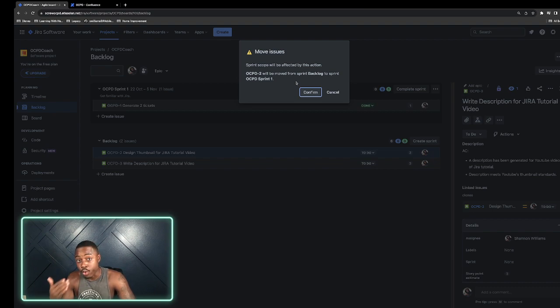And this is where you really get to optimize your performance, because let's say you realize you're only able to accomplish 6 total points, that's 6 points across all tickets total in a sprint. Now going forward, you probably can't bring in 2 5-point tickets at the same time, because it's 10 points and you probably won't be capable of doing that comfortably.